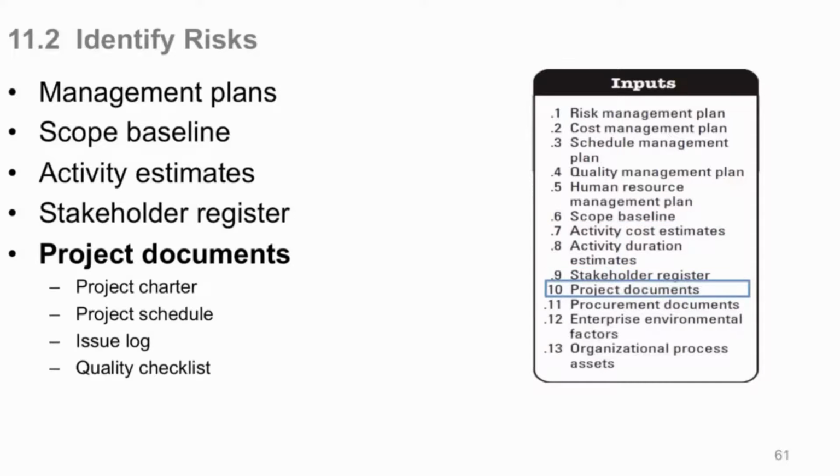Your stakeholder registers and input, of course, has your stakeholder tolerances and items like that you need to manage, and they're good sources of information about risk, too, as we talked. Project documents come in, the project charter, the actual project schedule is subject to risk. Now the project schedule, as we'll see, is different than your schedule baseline. And I'll just tell you here, and you remember it later when we get into time management, your project schedule is, in the most simplistic form, your Microsoft Project Gantt chart. Okay, your project schedule, broken down by your WBS. And it is a living thing.